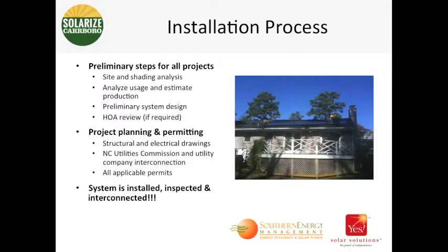And I would say the average time frame for an installation of a solar system on a residential is somewhere around 3.5 to 4 days. We manage to come back and meet the inspector, but generally speaking, the crew's going to be out there unless there's a weather delay or some other factor. We're going to be out there for 3 or 4 days and we're going to knock the system off.